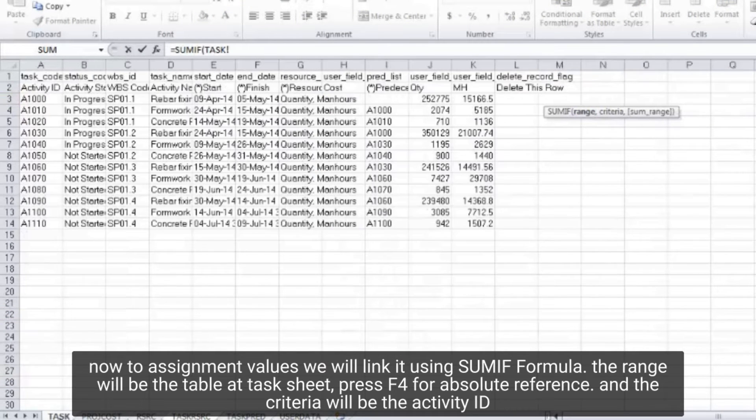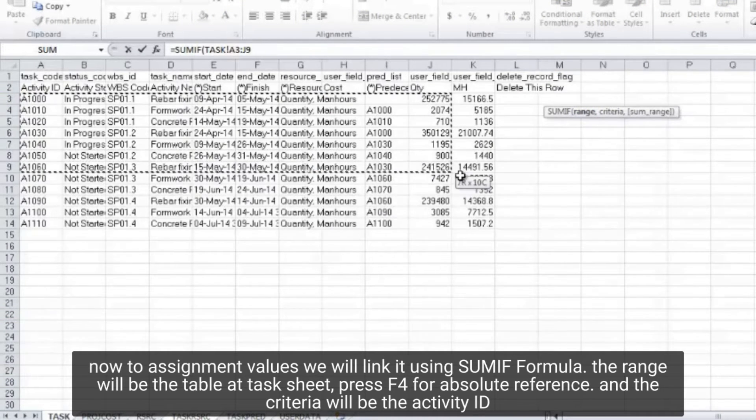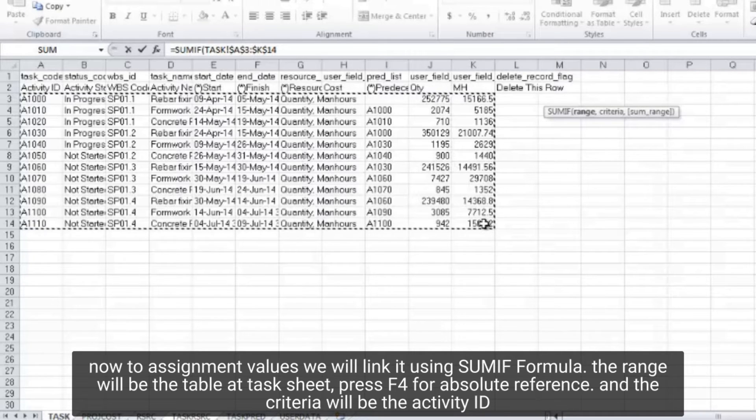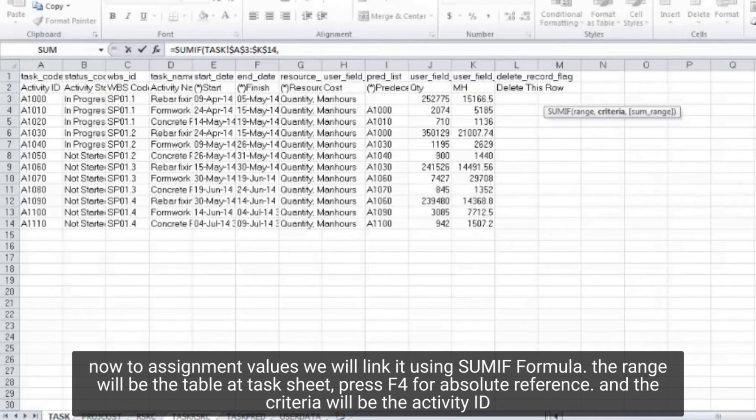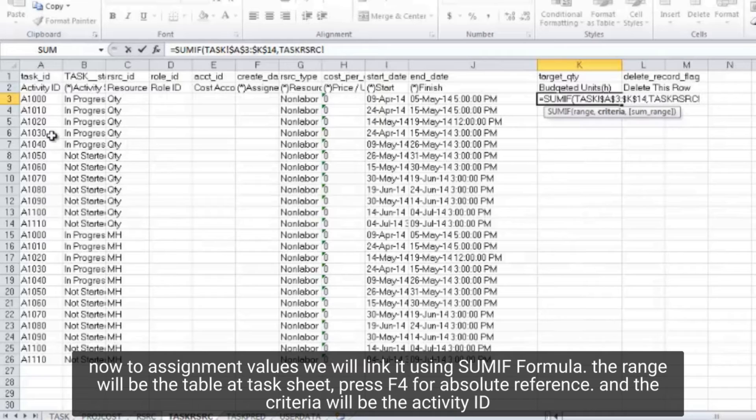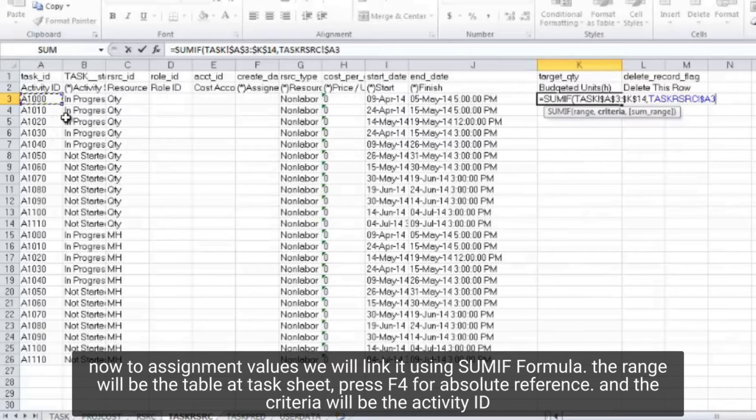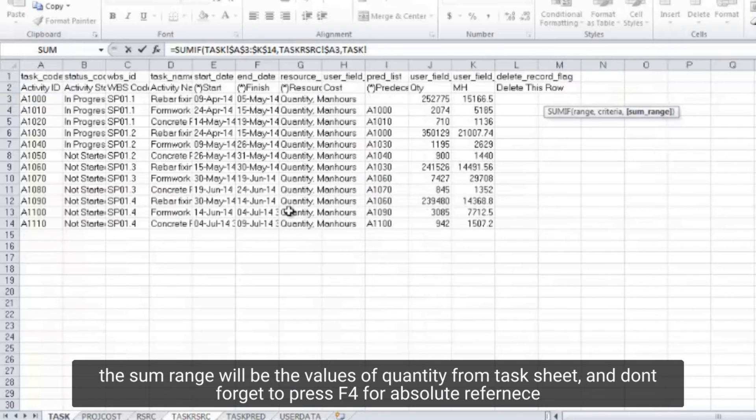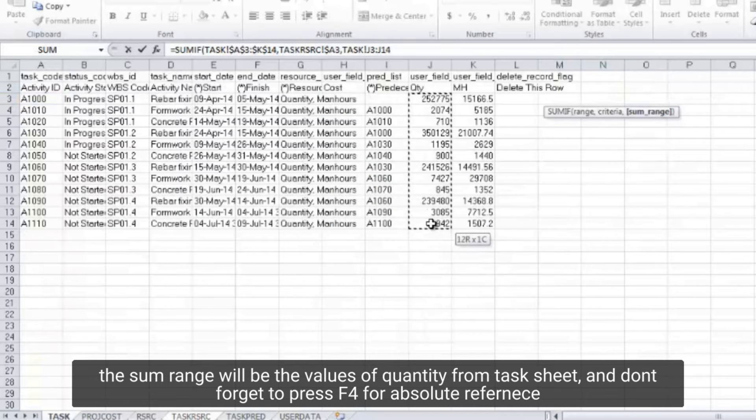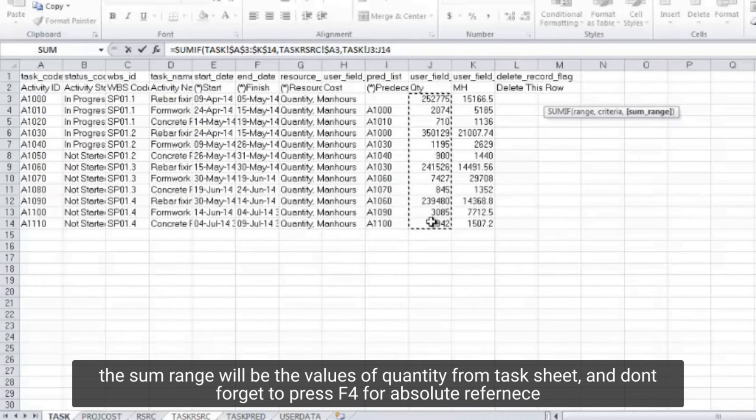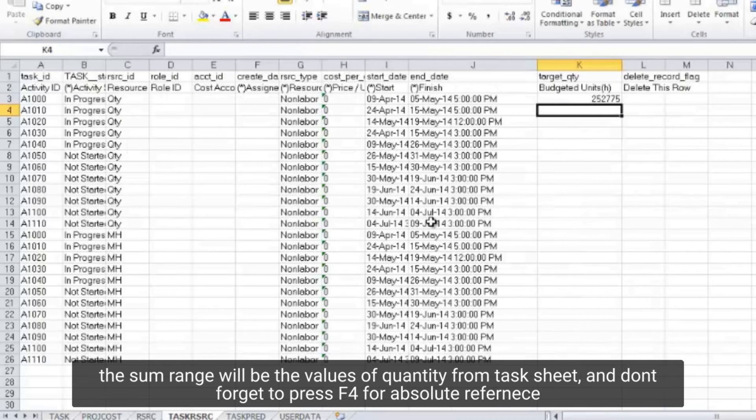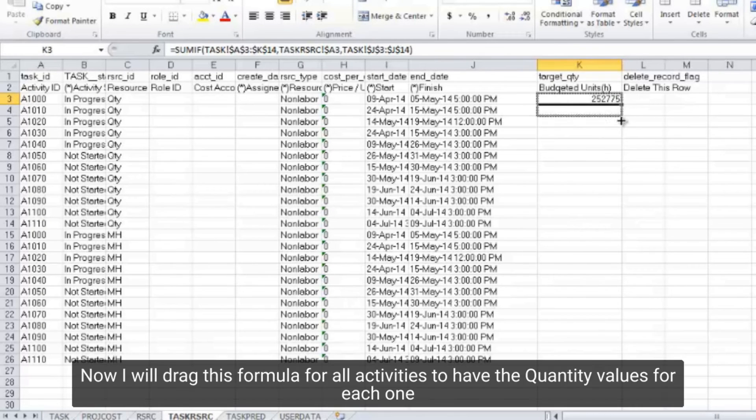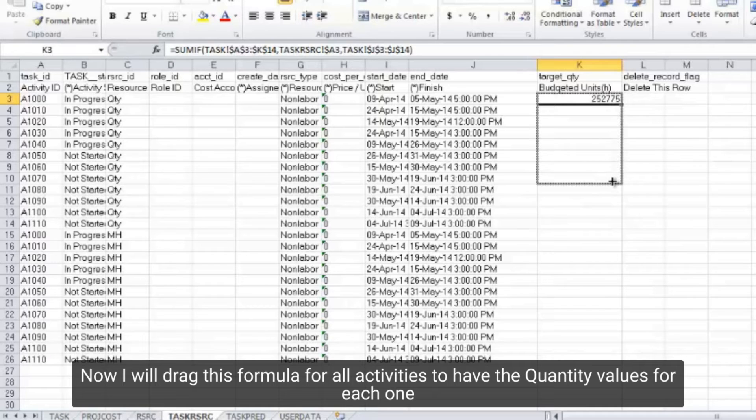The range will be the table at task sheet, press F4 for absolute reference. And the criteria will be the activity ID. The sum range will be the values of quantity from task sheet, and don't forget to press F4 for absolute reference. Now I will drag this formula for all activities to have the quantity values for each one.